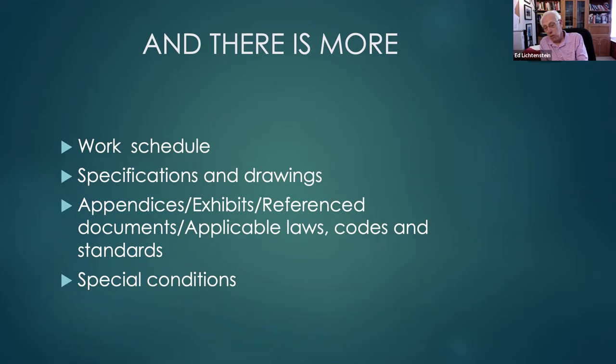So you not only want to apply the laws in effect at the time of the contract, give yourself a grandfather clause, or a certain edition of the codes and standards, so that if they change and if the customer requires a change, or the new law or new code and standard requires that you change, that can cost you money. And you want to be able to get paid for that change.